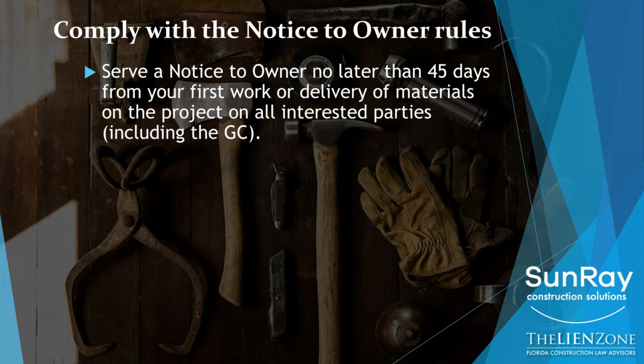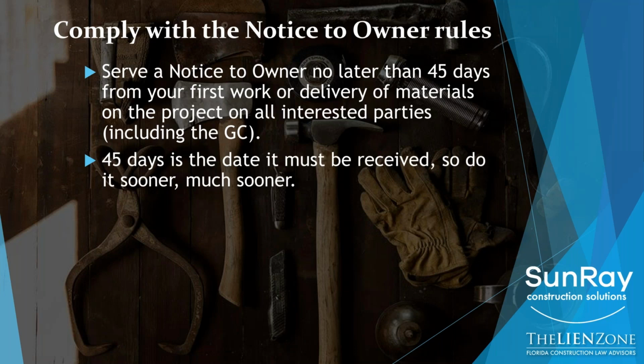So for example, if I am the subcontractor on a project, not only does my notice to owner need to go to the owner, it needs to go to the general contractor. 45 days is the date it must be received. So you should do it much sooner. So if I put it in the mail on the 44th day, it's probably not going to get delivered on time.